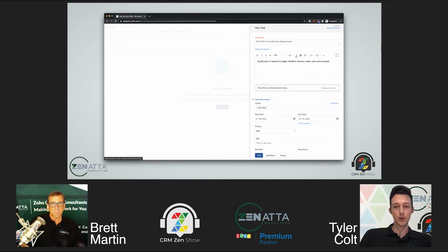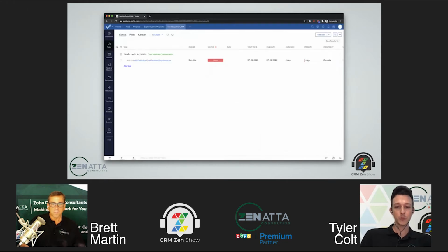So we're going to assign an owner. And then within this, the milestone is starting on the 28th, and so the task can start that date as well. But I'm going to say the due date's just in a couple days because this shouldn't take us too long, and we want to make sure that we move through this quickly so that we can hit the rest of the items inside of this milestone. Of course, we can also assign it a priority there on that view. And since this one's kind of key, we assigned it a high priority.